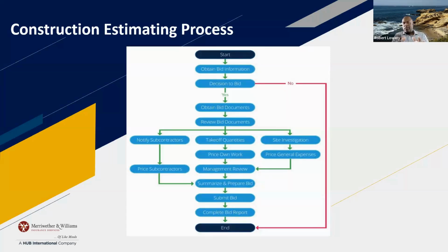Now, your general conditions are more of your management and admin people attached to the project, not your workers working in the field. That is not general conditions. So your foreman is not going to be working; he's supervising. So he or she is considered general conditions. You as a project manager, accountant, project engineer, all that is under your general conditions. There are miscellaneous things that go under that.